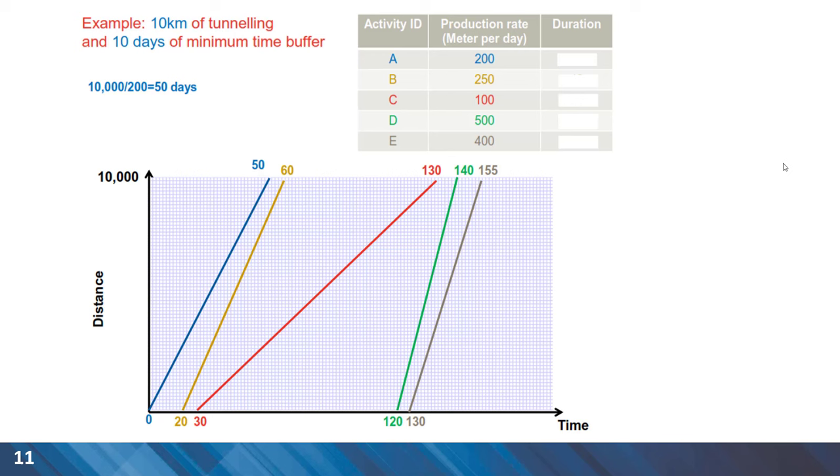Activity C is a slower activity than B. The buffer is considered for the start time starting at 30 days and then the duration of 100 days. We have the finish time. Then activity D is faster than C. We consider the buffer for finish time. And finally activity E is slower than the predecessor activity D. Starting at day 130, the activity finishes at day 155 and also the project finish time is 155 days.